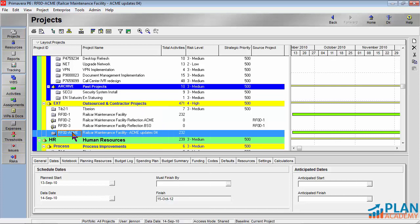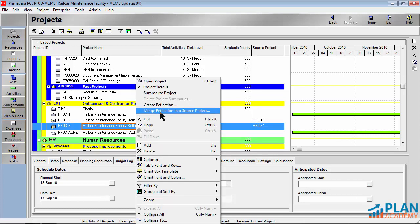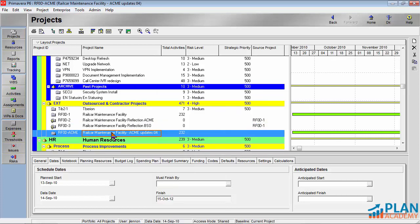So if that does happen, there's a workaround for you. The workaround is essentially to take the updates from this and to copy them into a reflection project. And then we can do a merge. So, a little bit of manual work on your part, but in case you forget to do these setup steps that I've outlined, then that'll be the workaround you'll want to follow.